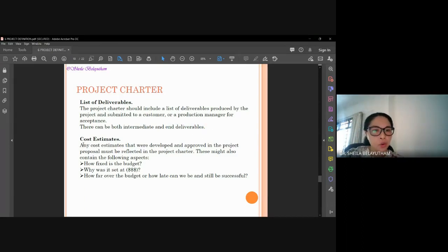And also what potentially could be the cost estimation for this project. This is basically how you come up with a simplified cost estimation. It will not be based on drawings, it will not be based on a very detailed QS estimation or whatsoever, because you do not have any drawings produced at this point of time. So it is just a very draft cost estimation. At least you have a big figure rather than a decimal point.